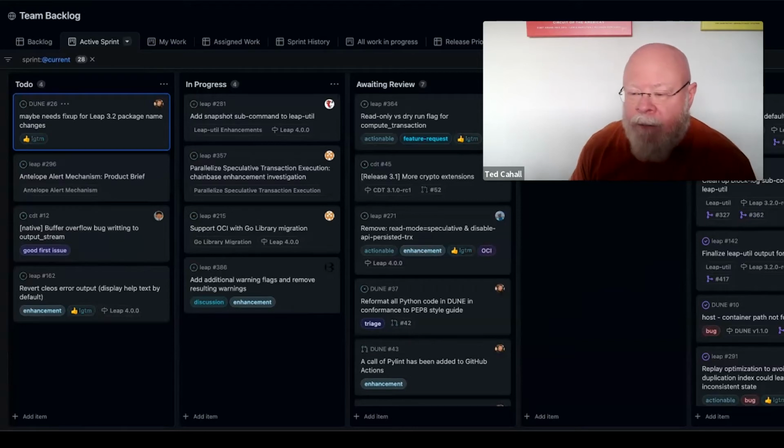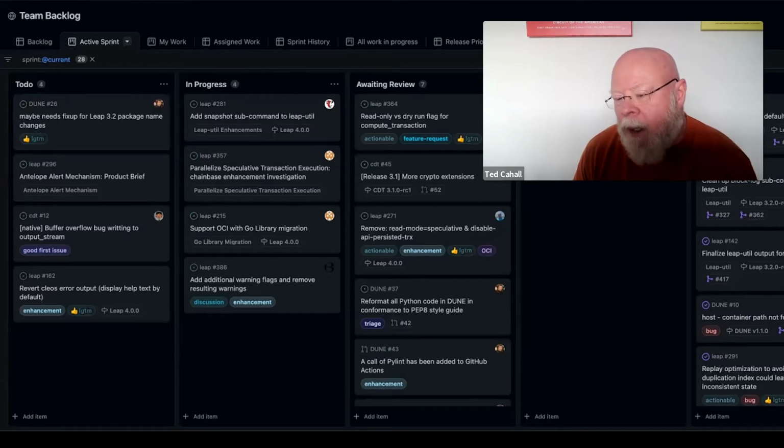And that leaves a lot of this, whether it's cleanup or bug fixing or other stuff, that will have to go into a budgeted allocation. So whether we budget 15% or 25% to that, there'll be a continual list of rotating priorities, which will be done more in this sprint fashion. And while we may still track in a sprint the longer range priorities, that's something we're still evolving into: how are we getting the plan of what's fitting into the March, April release put in the bucket first. And we just have not completed that.